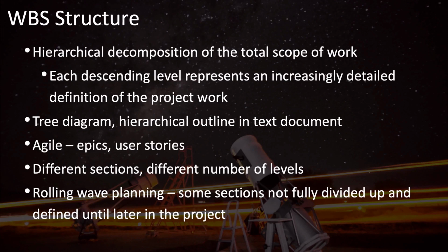However, for most projects, it won't really fit very well in a tree diagram, and so it's often captured as a hierarchical outline in a text-based document. In an agile approach, you may use epics, which further subdivide down into specific user stories.